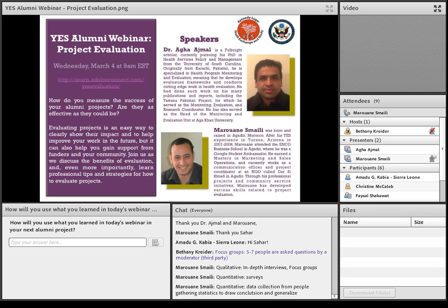There's also another thing, and this is more internal. For instance, to track the budget and the deadlines, you won't use surveys, questionnaires or interviews. You will do this on your own because you have the data already. You have the accounting, you have the receipts that you spent, and then you do the evaluation.